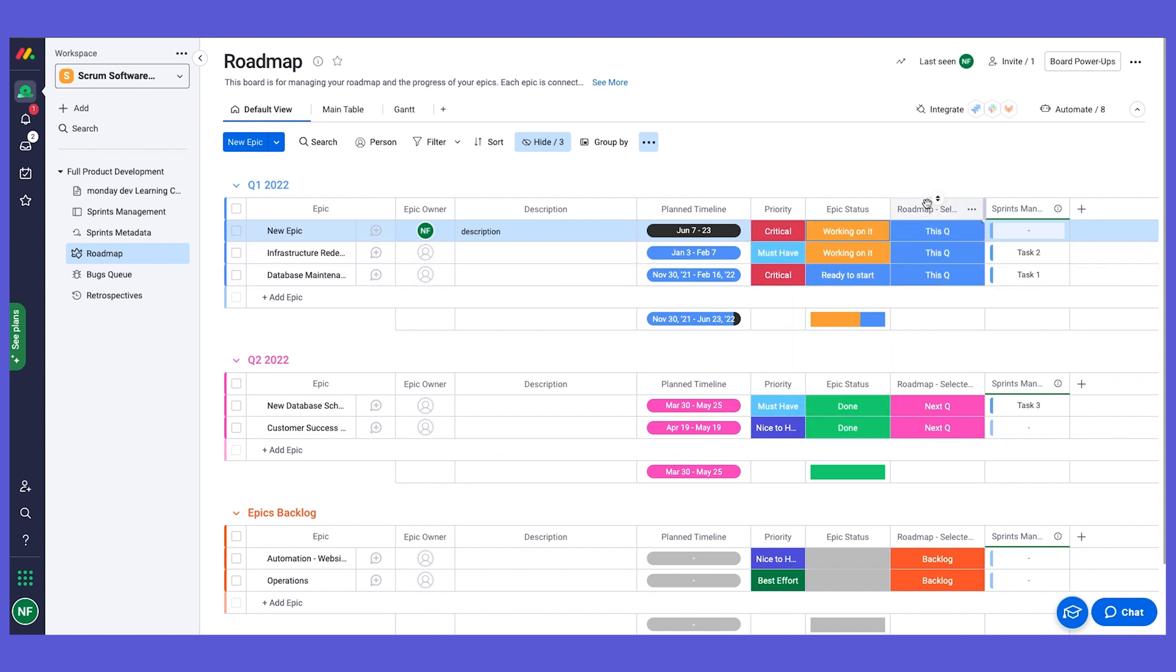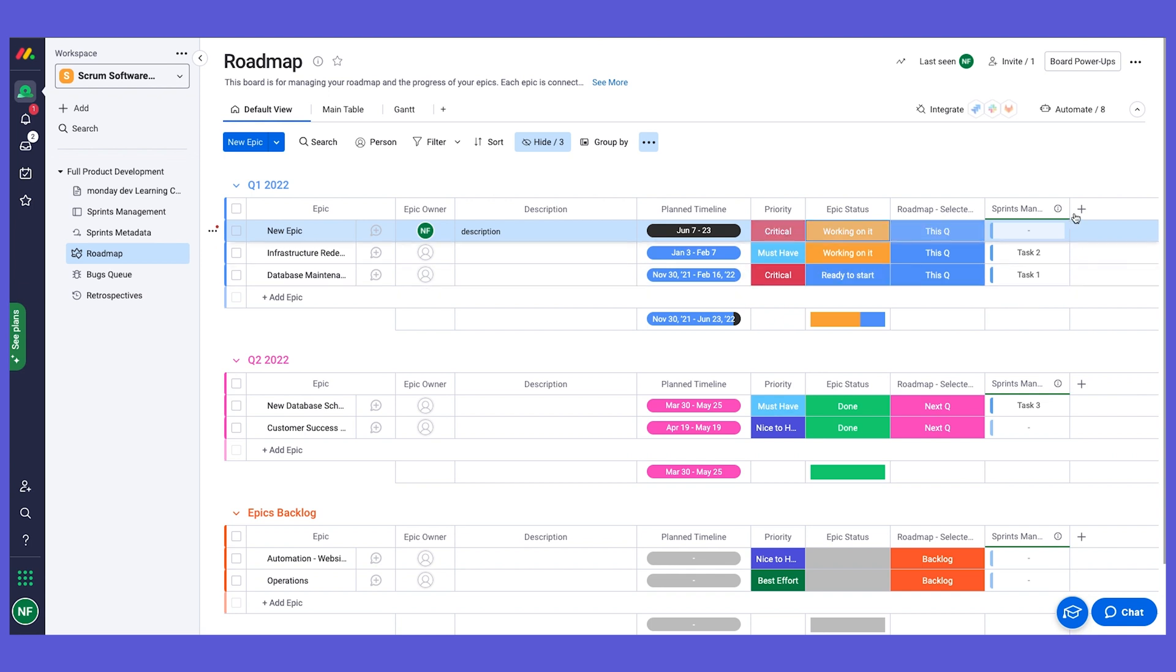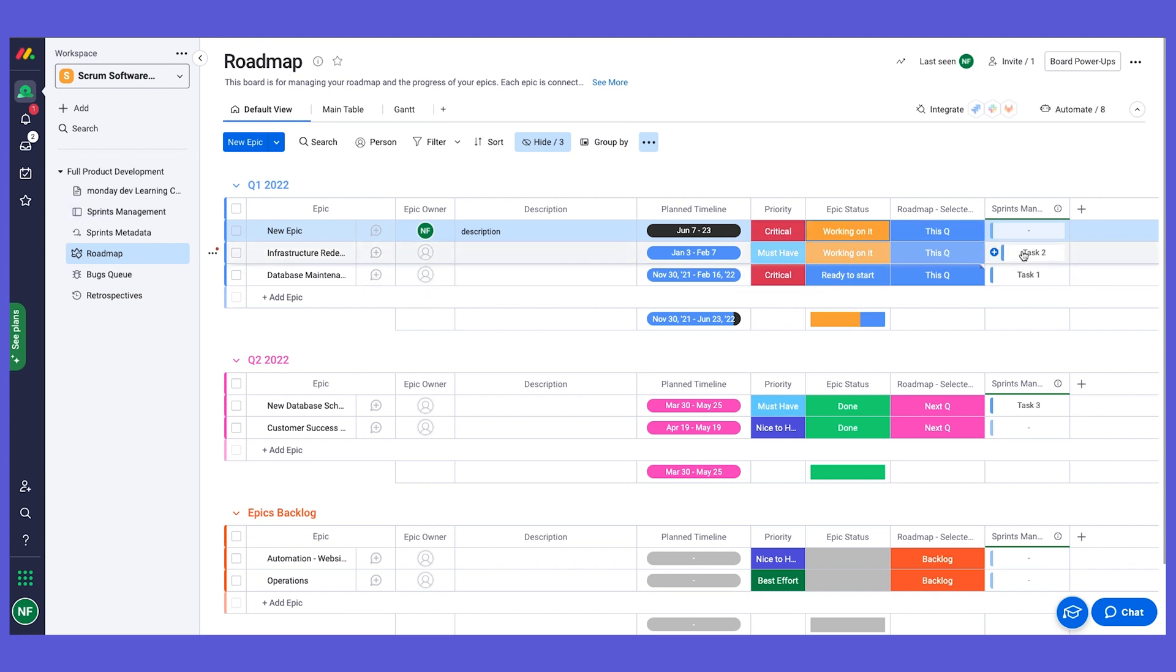We have a link to the tasks on the sprint board. This is to increase visibility between the dev teams and the product team, and to link between different tasks and the epics. We can use a connect boards column to link between the roadmap board and the sprints board, and then we can link the tasks to each of the epics. I will talk more about this column very soon.